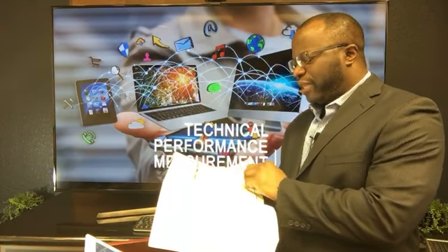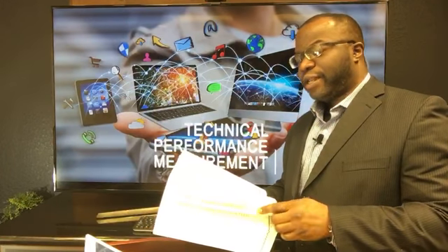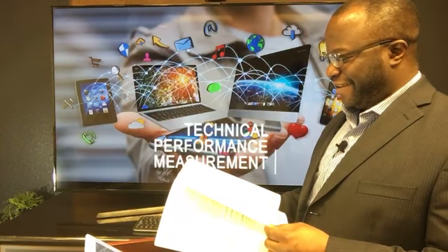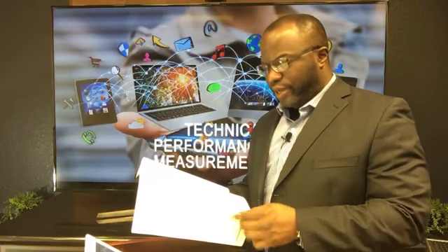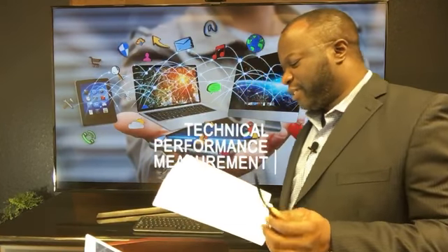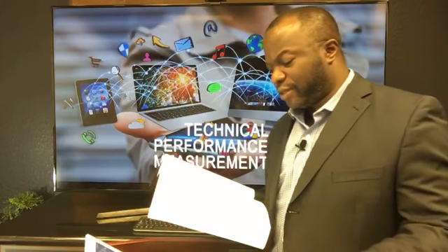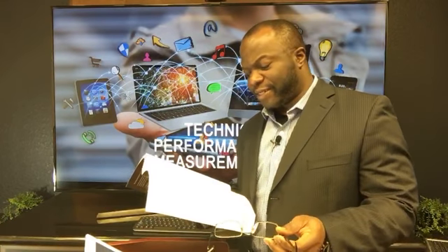It's one of those subliminal ones that you just hear and you're like, oh, it sounds familiar, I'll skip it. Kind of like schedule model that we were talking about previously. But these are some of the things you want to hone in on. Page 352, it says technical performance measurement compares technical accomplishments during project execution to the schedule of technical achievement. We should have gotten to the point where we could use interface X, but we're not there.